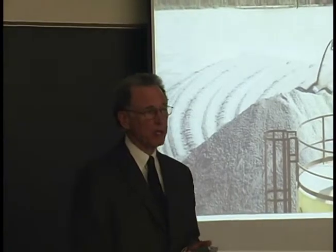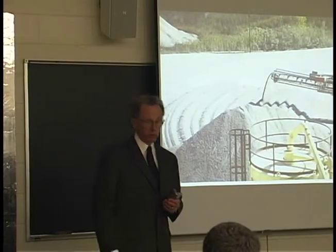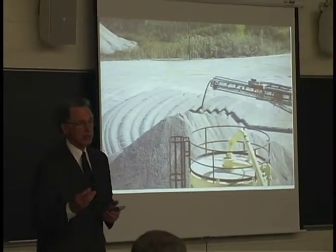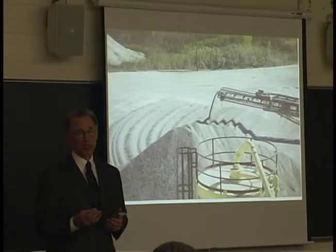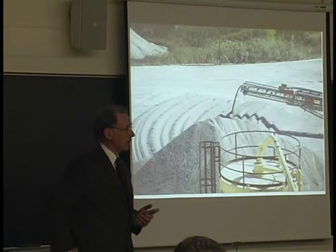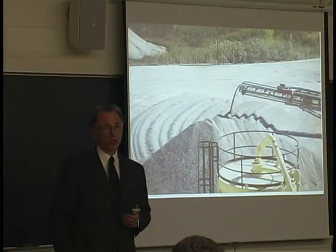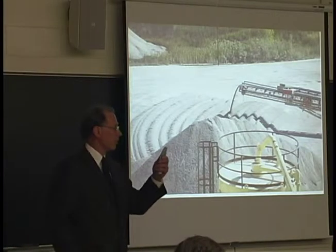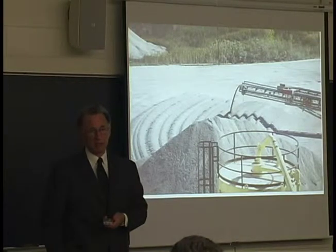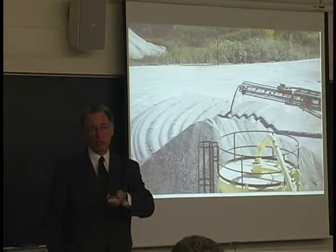After we bid a project for IDOT or most municipalities, after the award, then you normally have 15 or 20 days to get your subcontractors lined up, to get your bonding in place, to get your insurance in place, and those types of things. And then you have to start the project. So again, it may not be something like if you're building a part of a subdivision or building a home for somebody, you tell them, well, when I finish this home, I'm going to start on your home. The state doesn't buy that type of thing. What they say is, you've bid it, here's the date, 20 days later you're going to start the project.